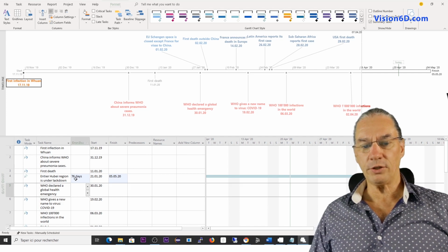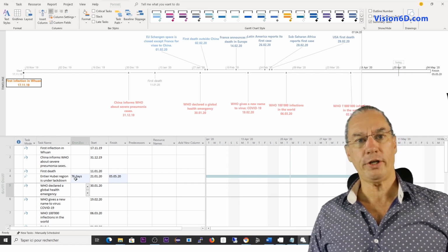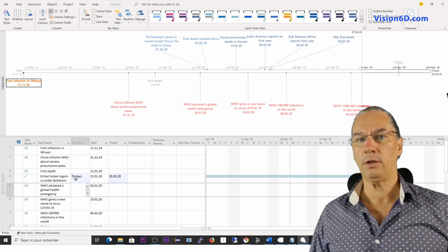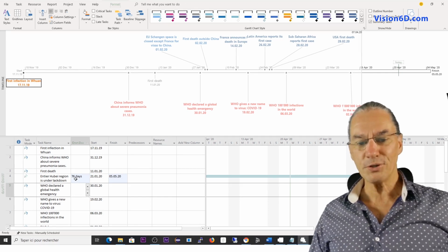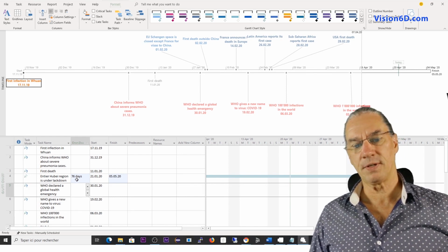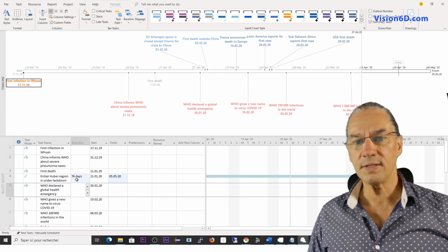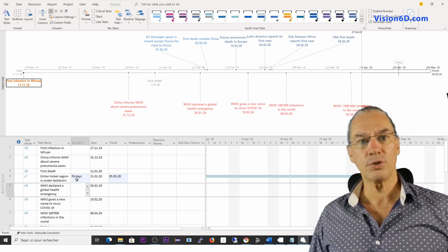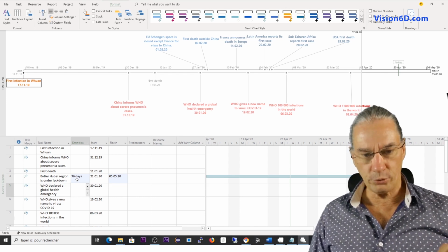Because when we give here a duration time, it's counting working days. So it's skipping weekends. It says, no, people were not ill or the pandemic wasn't effective during the weekend, which is absolutely wrong. This is a behavior that we expect for tasks since we are working with the normal calendar, in which usually we don't work on weekends. But here it's not suiting our case. So to change the calendar is a bit complicated for what we are doing right now.